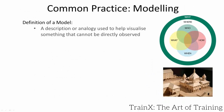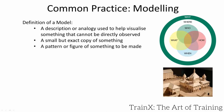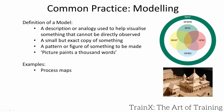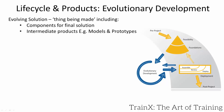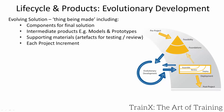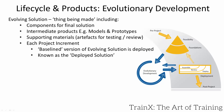A picture paints a thousand words. Models and drawings have been used for centuries and aid understanding of concepts that might take thousands of words to describe. Prototypes are just one example. The evolving solution is essentially everything being created, which can include models, test scripts and so on. Value is gained by frequently deploying project increments into use. Deploying the in-house system before waiting to develop the commercial version would bring early value and influence the later increment through lessons learned. Baselining means understanding the exact elements that are deployed to allow consistency, and is often tied in with version numbering and configuration management.